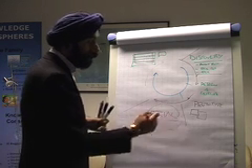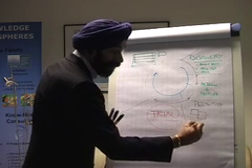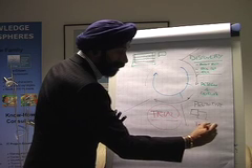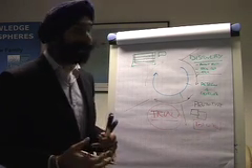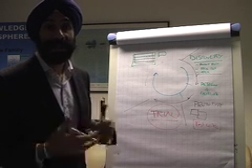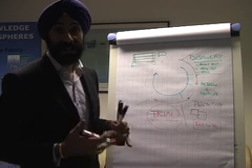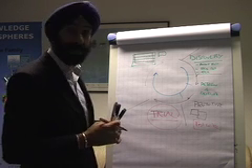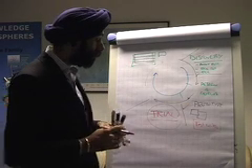Once the trial has been set up, before we do the trial we can actually set some test criteria. Again, it could be a document, an acceptance test specification. There may be a project board operating. So with the project board, we can say to them, these are the acceptance criteria items that we're going to use, and these are the tests that we're going to have, and we'd like you to sign it off before we move on to the next bit.